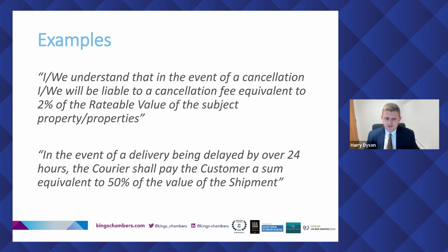Was the contract for one specific item that both parties knew the value of? Did the contract, or a representation, specify why it had to be delivered in time? It may well be established that this is enforceable, and of course, on the face of it, we don't know the value of the shipment. So whilst this does seem a fanciful clause, and one that certainly the likes of DPD wouldn't sign up to, it may well be enforceable.